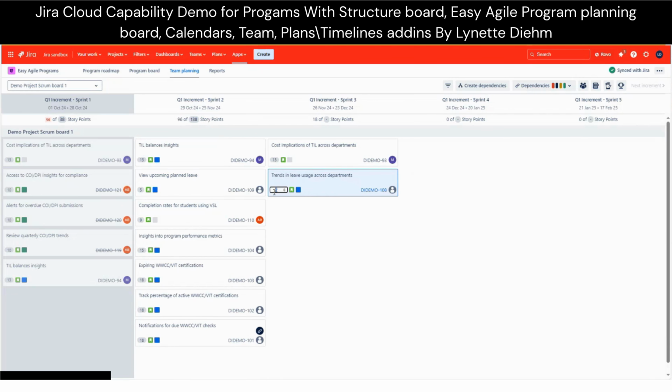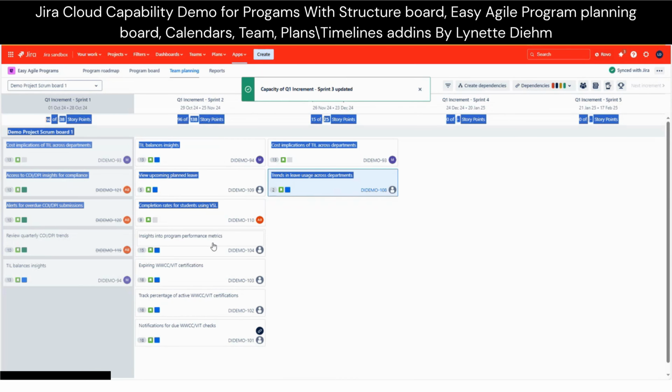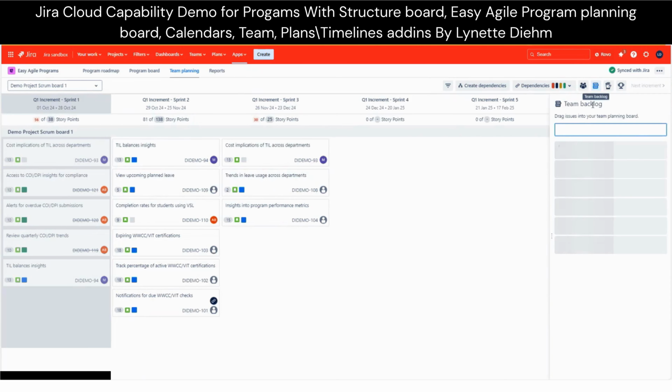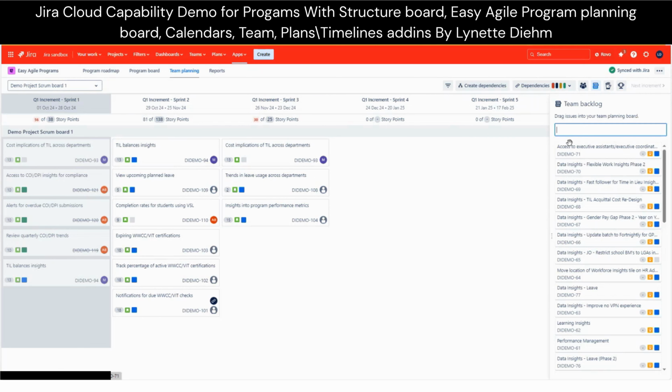That one's closed off at the moment, but for example, we can move that one to there. You can change the story points, and it'll total up here. I don't know, team capacity of maybe 25. Take it from there. You'll also be able to, from over here, see the team backlog. So you can search on all the different things that are in the backlog, and you can click and basically drag them into the sprint. So that's really good for sprint planning.